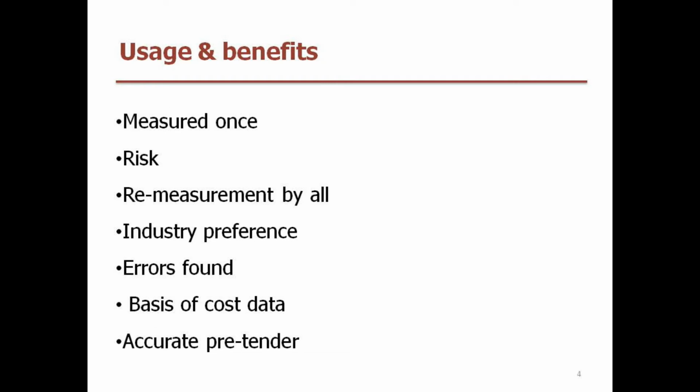Remeasurement. Again, with a bill of quantities, because you've got those schedules and that list of items of what makes up the building, it's very easy to adjust any components of the building. It might be doors, it could be a number of different things that changes, and it's easy because you've got how many doors are already there, a price next to it, and so forth.